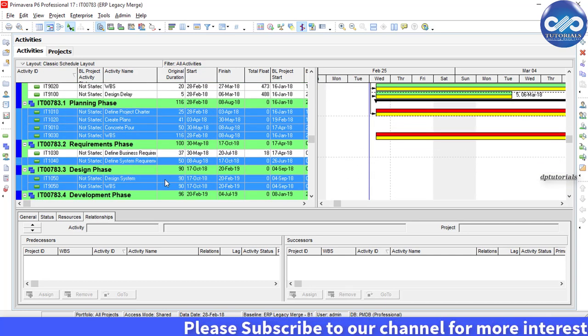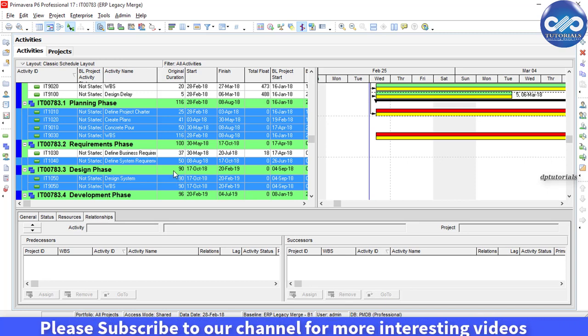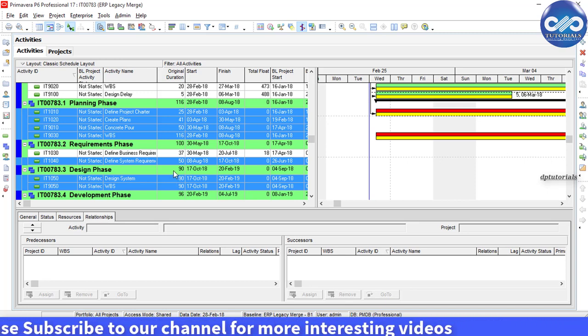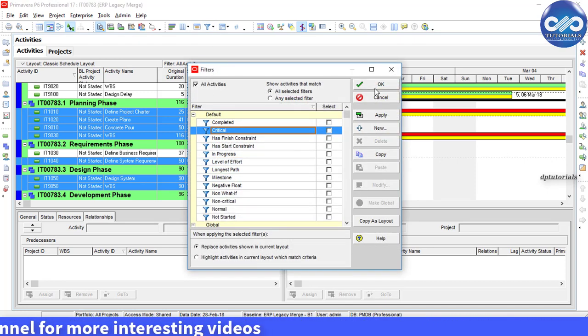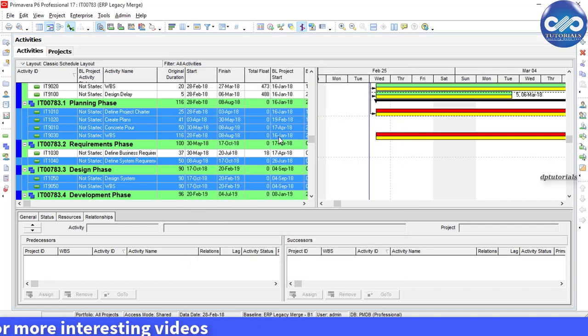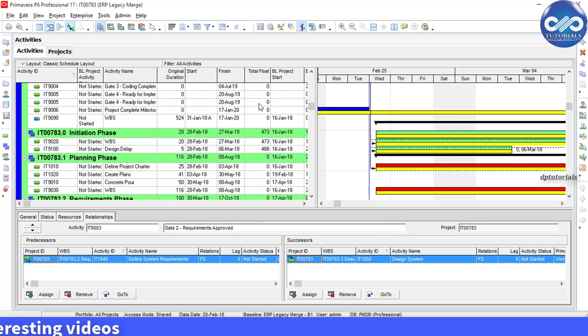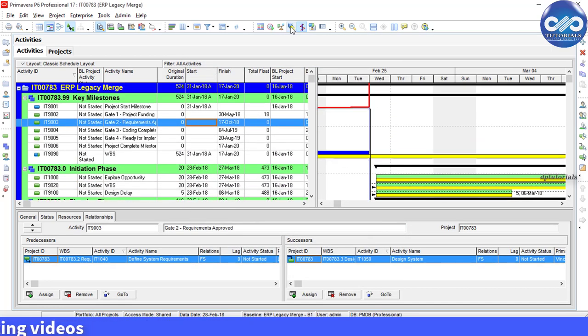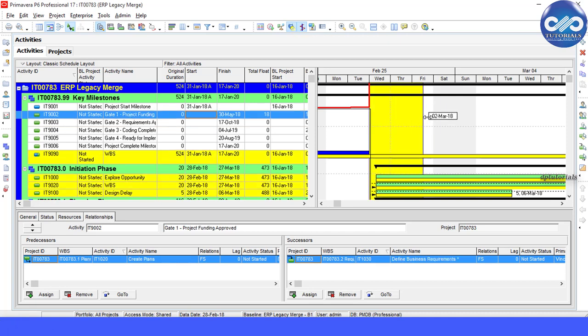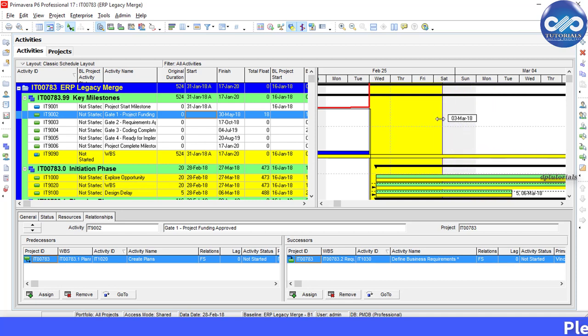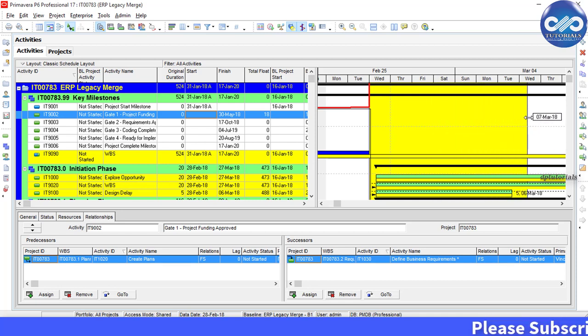Now, suppose we want to highlight all the activities from the current data date to a specific date. We need to use the progress spotlight feature. Click this. Left click on the high range edge of the spotlight and move the cursor to either the left or right depending on the high date that you would require.